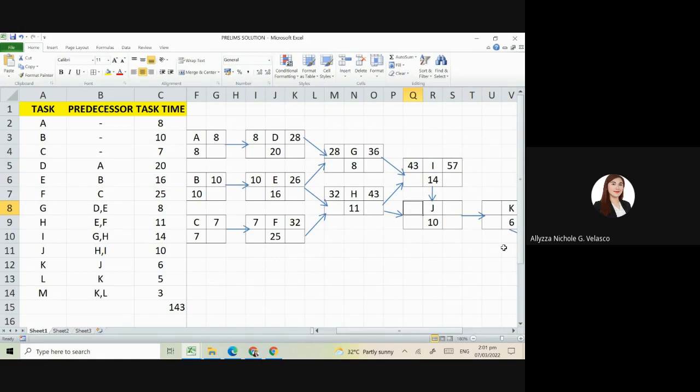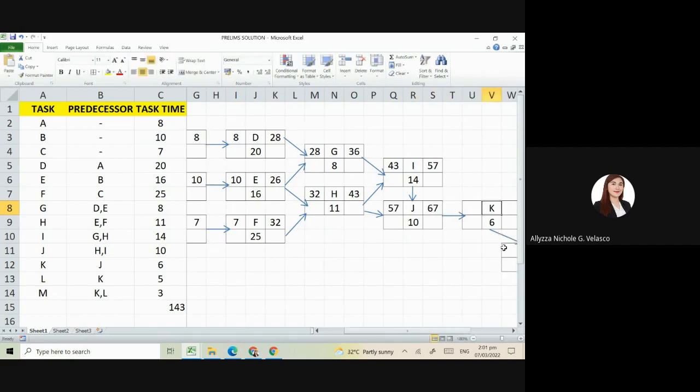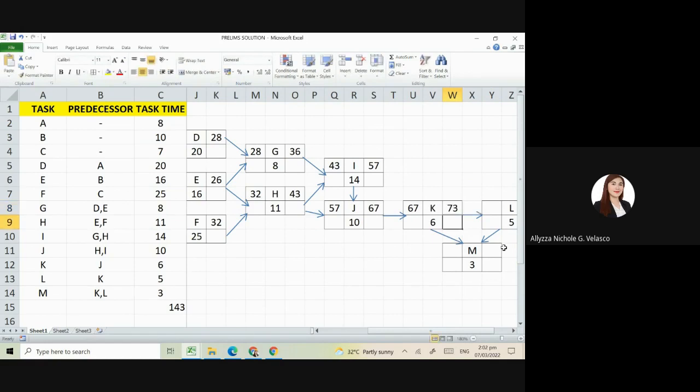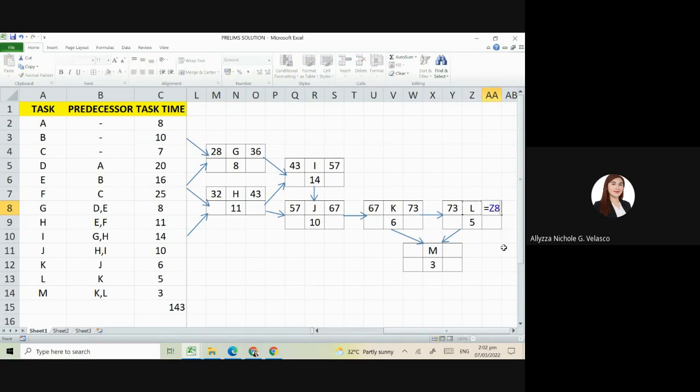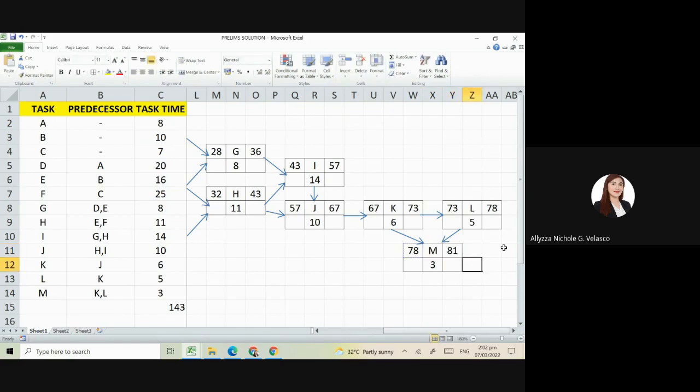Next, J is connected to H and I. The bigger one is I having 57. So 57 plus 10 is 67. Next is K, connected only to J, so just copy 67. So 67 plus 6 is 73. Then L is connected to K only, so copy 73. We have here 73 plus 5. Next is M, connected to K and L. The higher one is L. So we copy 78. So that is 78 plus 3, that is equal to 81.